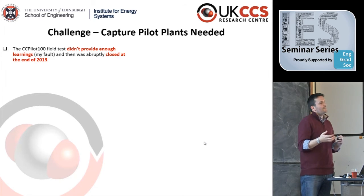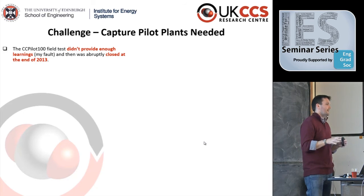And the lesson you can take from this is that it's really, really easy to blame somebody else for this problem, right? You can say, oh, the government doesn't support CCS, or people don't really understand how this is working, or the project management was bad. But in reality, that is completely on me. That was a huge technical risk that I had sort of known about and just didn't contingency plan for at all.